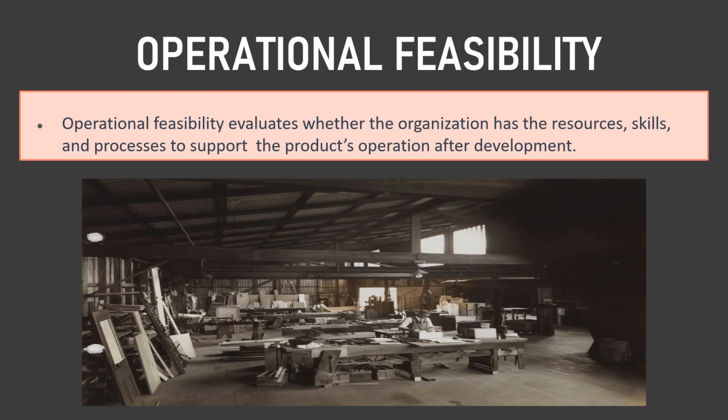What is operational feasibility? Operational feasibility evaluates whether the organization has the resources, skills, and processes to support the app's operation after development. It considers factors such as customer support, server maintenance, scalability, and ongoing updates. In our example, the team assessed the operational readiness and identified the gaps in resources or processes. They plan to set up a dedicated customer support team and cloud infrastructure that could scale as the user base